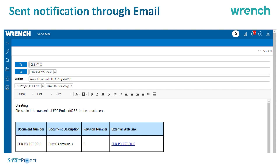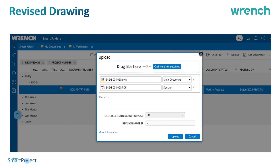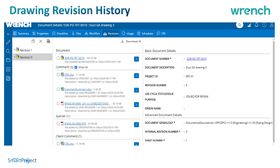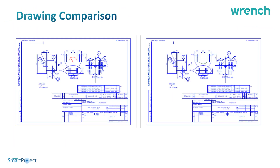Once drawings are sent for comments and the revised drawings are modified, the revised drawing can be uploaded by the concerned person into the system. When uploaded, the revision is automatically incremented and the system maintains the older revision with a complete history and audit trail of all comments. You can also compare between two revisions of a drawing — changes shown in red indicate deletions and green indicates additions — helping you verify that only the commented changes were made.